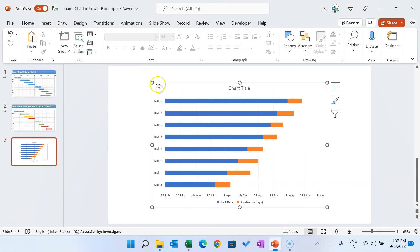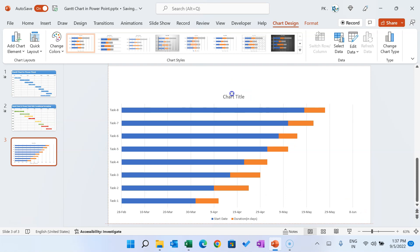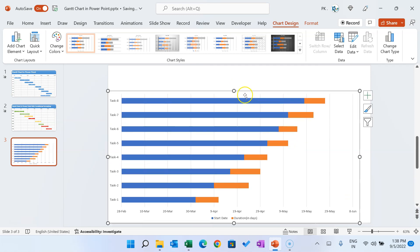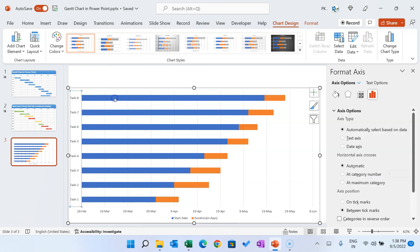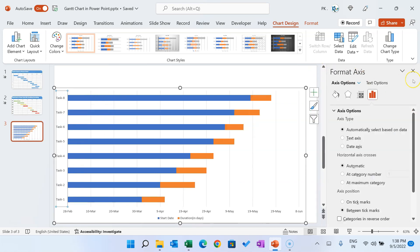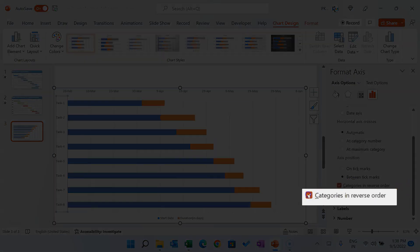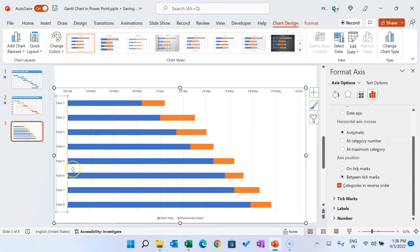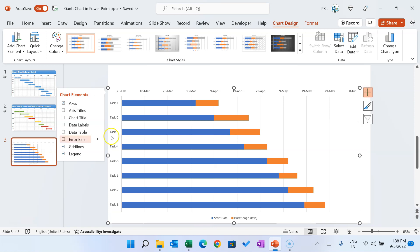The chart is available here — let's make it slightly bigger so it is visible properly. Remove the chart title; you can use the slide title instead. You'll notice the task order is incorrect — Task 1 is appearing last. Double-click the axis, go to Format Axis, scroll down, and check 'Categories in reverse order.' Now the tasks are in proper order.